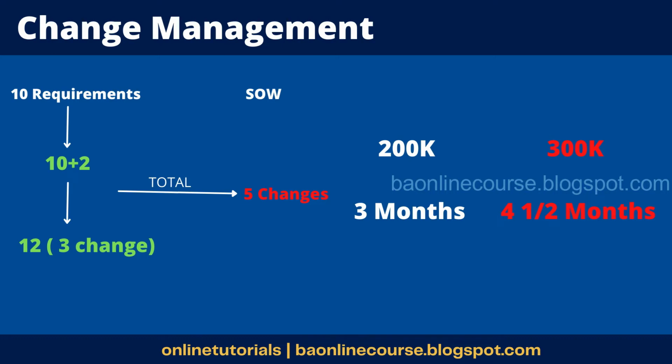So existing, I mean, you captured 10 requirements, right? So let's say the customer comes in during the design, development, or during the testing, right? So already after the BRD is baselined, after that he wants the change. Okay, fine. So it's not during the BRD, after the BRD is approved, right? So it has to be approved again.